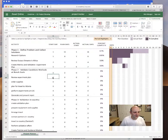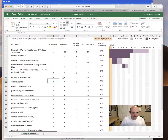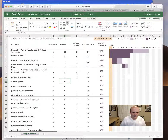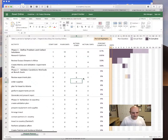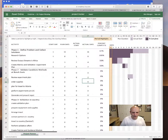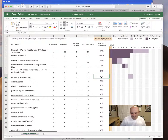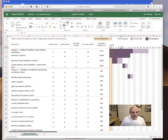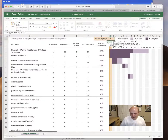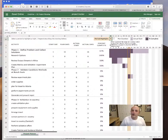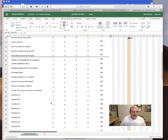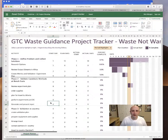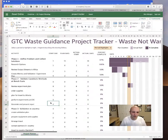So I can only start this since I have this started on day six, take two days, it could only start on day eight, so I'd have to put an eight here. And let's say I wanted this to last, this was going to take two days, then you would get those things here. I have to put eight and two here for expectations and then it would tell you how far you're done. And if I was 50 percent done it would fill that in. And we can just tell it like what day it actually is right now. You could say it's day eight and it tells you where we are.